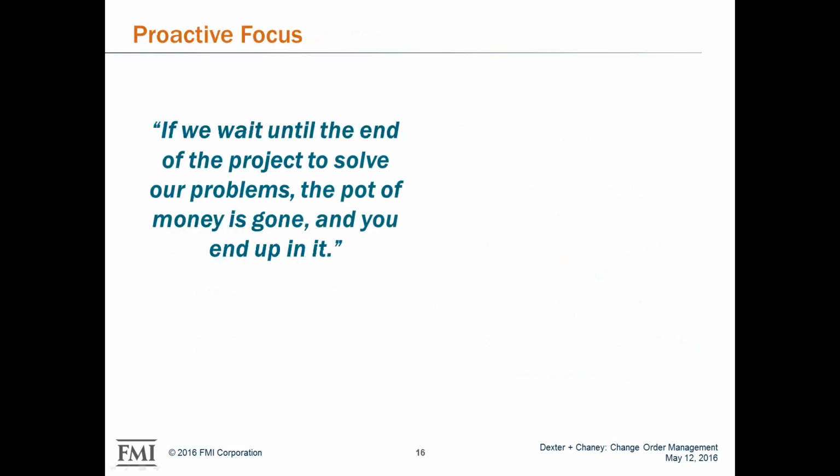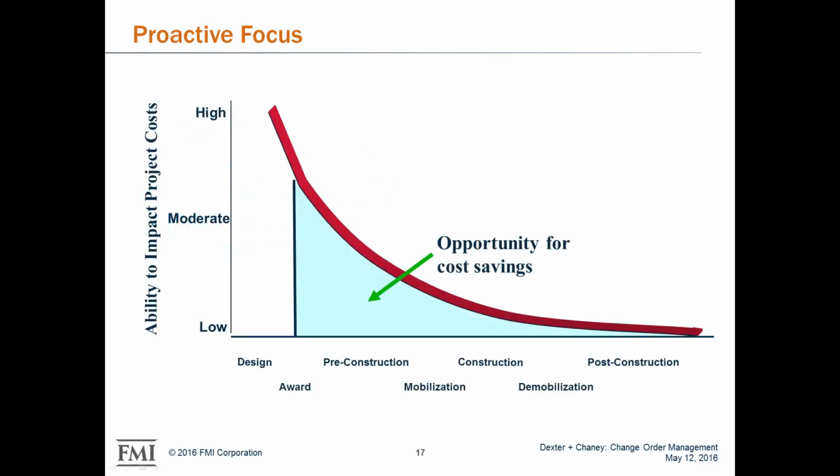So a proactive focus. If we wait until the end of a project to solve all our problems, the pot of money is gone and you end up in a hole, and that's somewhere that I don't think any of us want to be. So with this proactive focus, as you can see from the chart on the screen, you've got an opportunity for cost savings, and most of that opportunity is in pre-construction. It's before you mobilize. Once you get into construction, and then once you're actually finished doing any work, there's really no opportunity left to save any money.